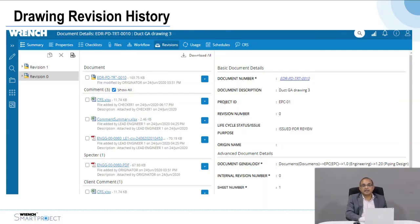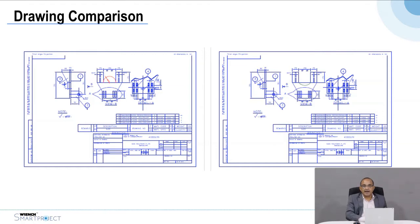Once comments have been incorporated, the contractor can upload the revised drawing. Automatically, the system shifts to the latest drawing and the previous revision along with its complete history is maintained. The system always shows the latest revision while preserving all prior revisions with their comments. You can also do a comparison between two drawing revisions to see physical changes, minimizing the effort required in commenting.